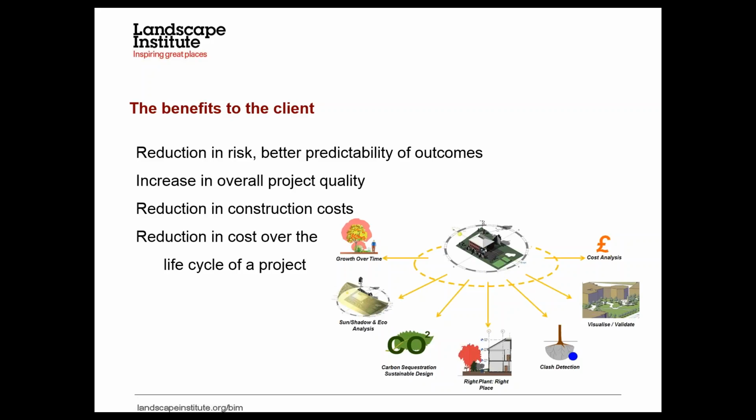The client can then make a valued decision, and if you can hit that within 10%, then you know that it's going to come back to you for more projects, because you can guarantee that if you're saying it's 5 million every time, it's going to be 5 million. If you're saying somewhere between 3 and 6 or 7 million, then the client's got a bigger decision to make. And if it's going to be 7, that could be a problem. If it's going to be 3 and it ends up being 5, that's a problem.